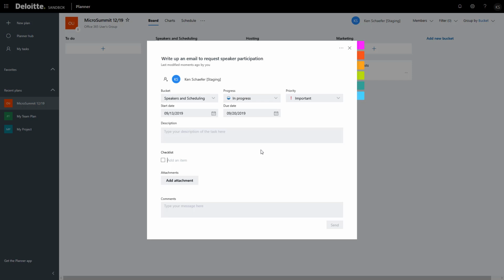Say we have 10 tasks to get this email campaign done. One approach some people use is to create a task for each of those little steps. But Microsoft Planner gives you an out so that you don't have to have so many tasks on your Kanban board. The individual tasks can have many subtasks associated with them in your checklist.